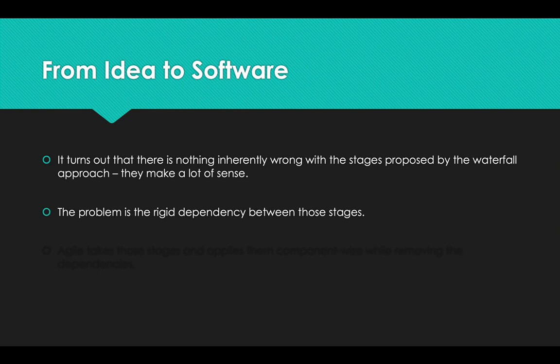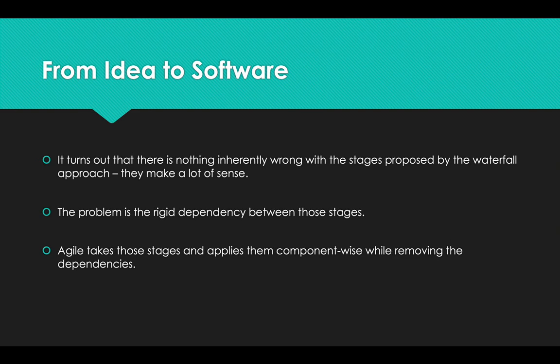The problem with Waterfall is that there's this kind of artificial rigid dependency between those stages that says, if something happens during implementation that changes even a very slight part of the analysis or changes a single requirement in a kind of obtuse way, then we have to scrap everything and go back to the beginning and redo a bunch of stuff.